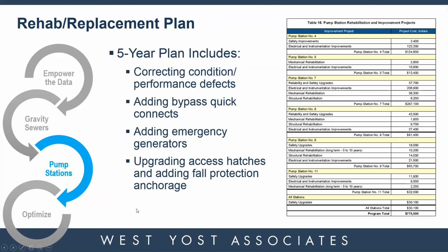So then that helped us develop a 5-year rehab plan for those 8 pump stations, identifying and correcting some of the condition and performance defects, adding some bypass pumping and other emergency generators, and also upgrading some safety features.